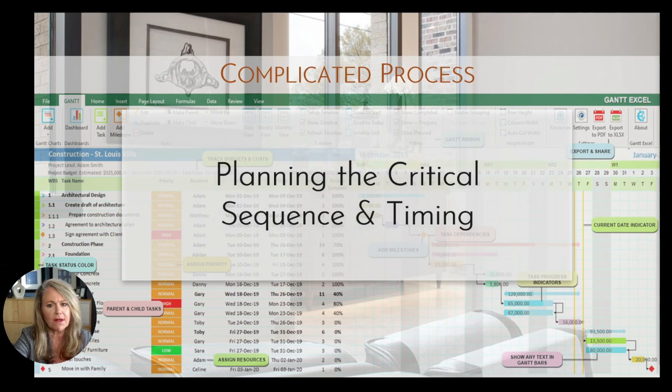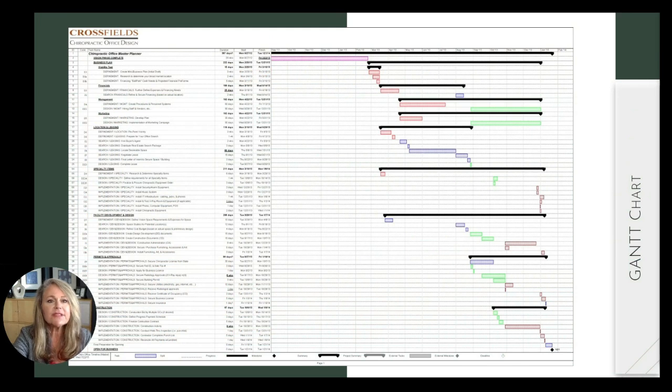So you don't need to know it all. I'm working to teach you the key items so that you have the roadmap to that success. Here's our roadmap. This is a Gantt chart. It's consistently used in design and construction, if you've ever seen one. Down the side is a list of all those tasks and categories, with tasks summarized under categories. Across the top is a timeline, and the bars represent the beginning and the end of each task, visually showing how these tasks, per category, are all layered on top of each other and how they're all connected.